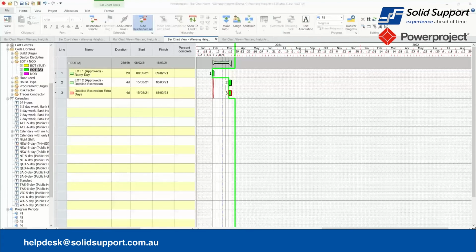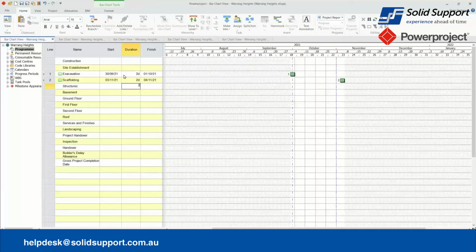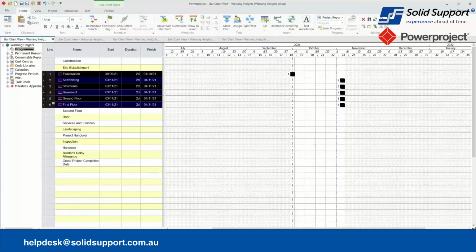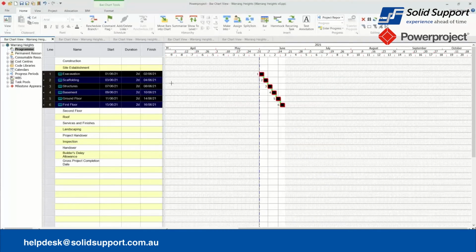Okay, good. All right, got a question here. I'm just going to answer one of the questions that came through in the webinar. The question was, how can we link a set of activities at once? We can actually do that, and I'm going to quickly demonstrate it here in this program. So I've entered the durations. I've selected all of them together. So I've just gone 1 to 6, add links, and we link tasks. And that's basically a finish to start relationship. And I'm just going to do a quick reschedule, and it's all FS.